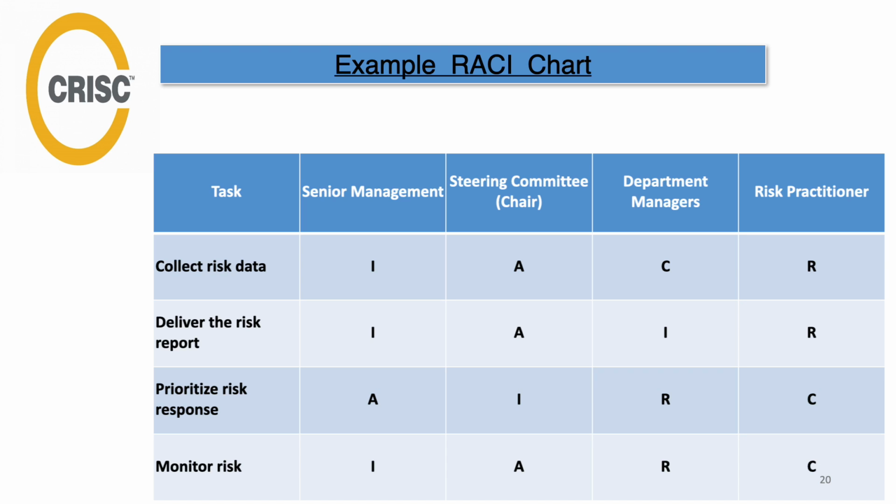Prioritizing the risk response. In this, the senior management is accountable, the steering committee is informed, department managers are responsible, and risk practitioners are consulted. At last, for monitoring the risk, senior management is informed, the steering committee is accountable, department managers are responsible, and risk practitioners are consulted.